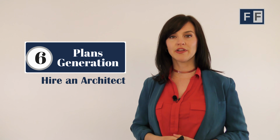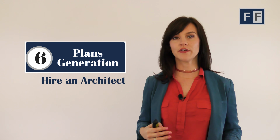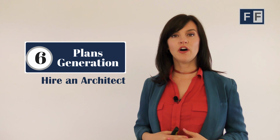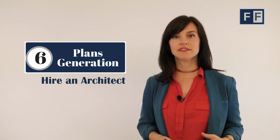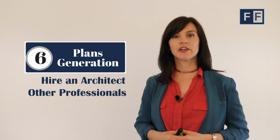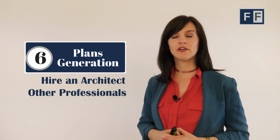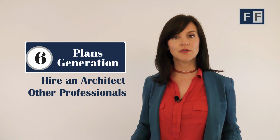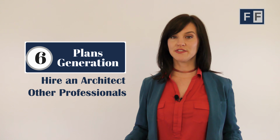Now, generally speaking, plans generation takes anywhere from 30 to 45 days, depending on the complexity of the concept. Now, understand that within the plans generation phase, you may also be working with a civil engineer. You may also be working with an attorney. You may also be working with community boards such as planning and zoning. So be prepared to deal with all of those individuals.